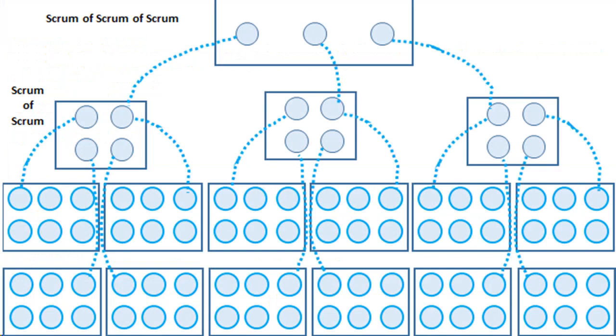Scrum of Scrums. Scrum of Scrums, SOS, also known as Metascrum, is a technique used when 2 or more Scrum teams consisting of 3 to 9 members each need to coordinate their work instead of one large Scrum team. A representative from each team attends a meeting with the other team representatives, potentially daily, but typically 2 to 3 times a week. The daily meeting is conducted similar to the daily stand-up in Scrum, where the representative reports completed work, next set of work, any current impediments, and potential upcoming impediments that might block the other teams.